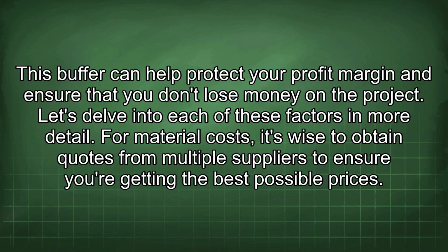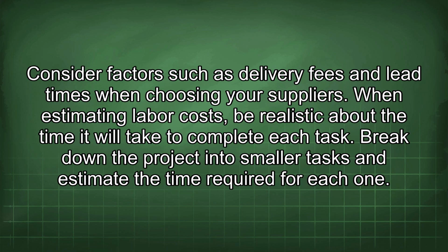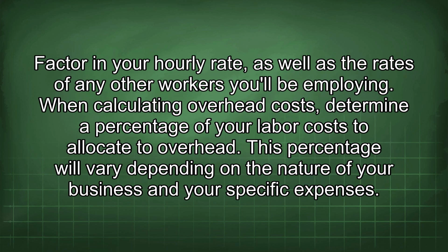For material costs, it's wise to obtain quotes from multiple suppliers to ensure you're getting the best possible prices. Consider factors such as delivery fees and lead times when choosing your suppliers. When estimating labor costs, be realistic about the time it will take to complete each task. Break down the project into smaller tasks and estimate the time required for each one. Factor in your hourly rate, as well as the rates of any other workers you'll be employing.